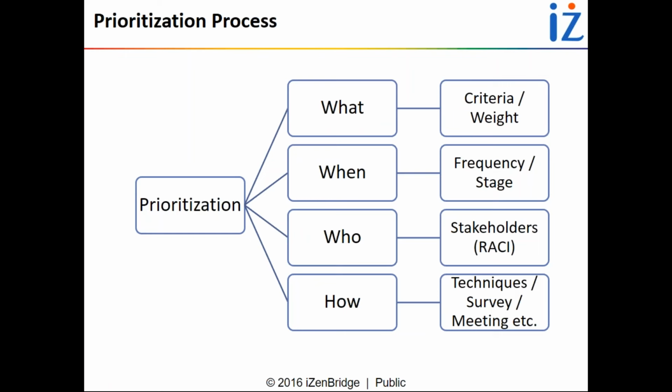When you are using an adaptive life cycle, when you are in an agile environment, mainly you reprioritize requirements after every iteration. When you are using a predictive life cycle, you do upfront requirement prioritization, and you may decide certain checkpoints where you check if the product is on track to deliver business benefits, and on the basis of that monitoring, you may reprioritize those requirements.